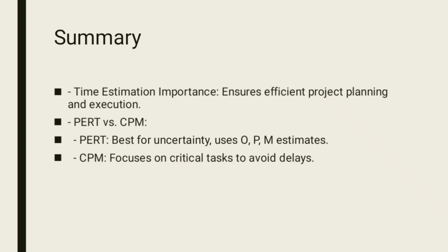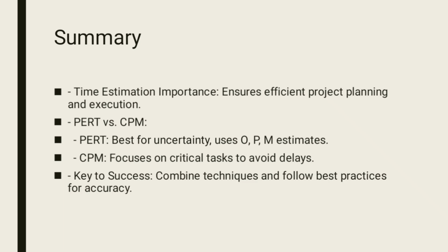PERT is best for those projects which you are uncertain about their outcome and their progress. The critical path method focuses on the critical tasks to avoid delays. For you to have a successful project, you need to be able to combine these 2 techniques when you are estimating time.